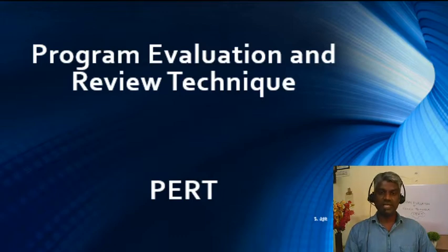Take for example a manufacturing company which is manufacturing car dashboards, and the processes involved from getting the raw materials, storing it in inventory, taking the particular raw material to the production area, and maybe filling the plastic material in the mold. Everything we know exactly the time of completion of each activity. So that is why CPM is called a deterministic tool, whereas PERT is a probabilistic tool which is applied